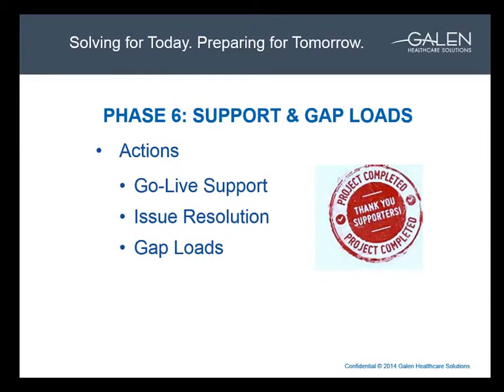Another client might decide to go into the conversion weekend with the data from the original extract, and then as part of the conversion, the Galen tech could identify the gap data that didn't convert and create these differential mapping workbooks. And then at that point, the process, no matter what the timing is, whether it's before, during, or after go-live, is the same: mapping any of those new data elements that were identified, and then a follow-up conversion to be done. So the gap analysis can be done post-go-live.